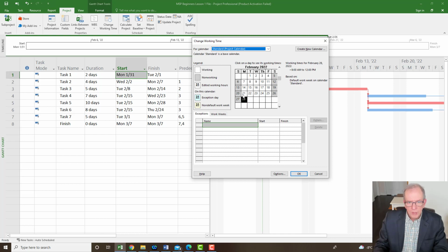And so being in Canada, most provinces have what we call Family Day. All right, you may have a different one with whatever country you're in, but that's fine. We can just get the exercise done and then you can look at whatever particular dates you want to put in for holidays on your own project. So the 3rd week of February is always what we call Family Day. So I click on the 21st first. I usually find that better than typing in here first, because if I just type in here, it'll put whatever date I happen to be on as the holiday, and then I got to play around a little bit to change it over. You can do it.